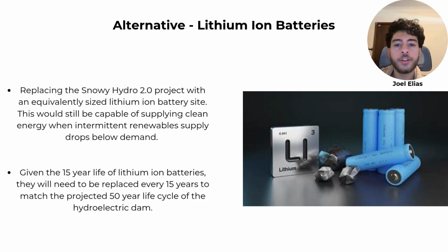Replacing the Snowy Hydro 2.0 project with an equivalently sized lithium-ion battery site would still be capable of supplying clean energy when intermittent renewable supply drops below demand. Given the 15-year life of lithium-ion batteries, they will need to be replaced every 15 years to match the projected 50-year life cycle of the hydroelectric dam project.